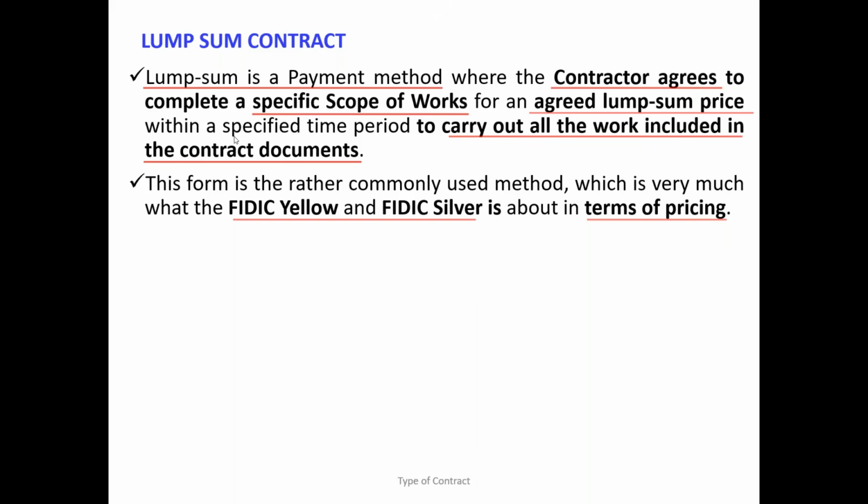That is the thing you have to think. Why? In the FIDIC red book, the design is done by the employer, and the price is under a remeasure contract. The quantities are approximate, not accurate. So it is measured and paid at the end. Many people misunderstand this when signing the FIDIC red book under the remeasure contract.